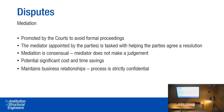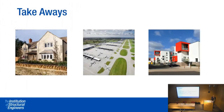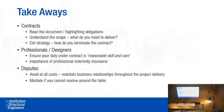Mediation: you should be encouraged, if you are about to launch a dispute, to try and see if you can mediate — resolve it amicably without the costs and complication of court proceedings. The courts will also promote it; at the first hearing the judge will ask whether you have thought about resolving by mediation. The mediator, appointed by the parties, helps them find a resolution but will not make a decision or give a judgment. There are potential significant cost and time savings, it helps maintain business relationships, and the process is strictly confidential.